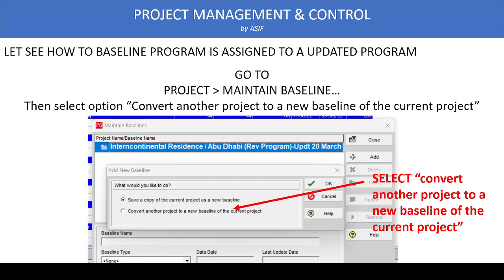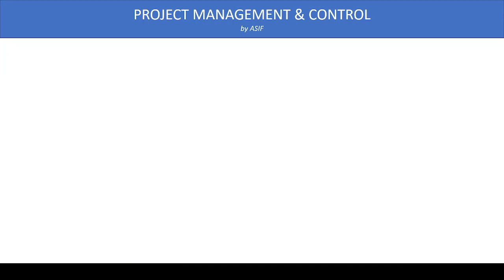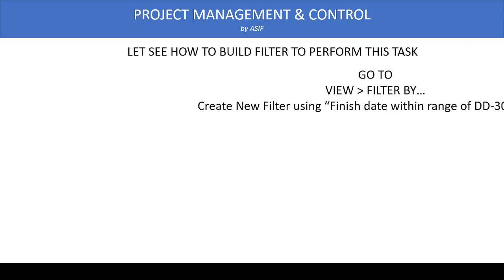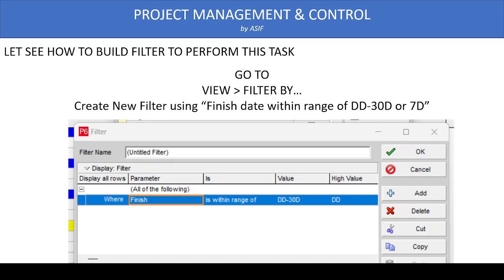If something goes wrong and you want to revert to the original situation, you just restore this project and your original program will be there. The other option is to convert another project into a baseline. We are using this second option — 'Convert another project to a new baseline of the current project.' Once we assign the baseline, to determine periodic achievement we use the filter option, setting the finish date within the range of data date minus the period — for example, data date minus 30 days for monthly or minus 7 days for weekly.